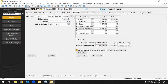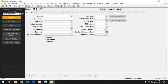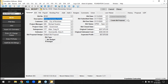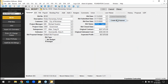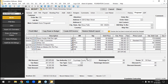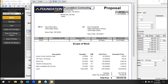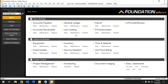I can manually enter a contract and estimated cost with retainage set at 10%. To whatever degree we want to break down job cost, I would break down that budget accordingly — estimated labor and material by each cost code category, or just as a whole. That can be imported from third-party estimating tools. I also track bids — projects before they're awarded, with win/loss information — and if awarded, it converts to an actual project. I can also create proposals with labor, fixed rates, and markups, then convert to a project.